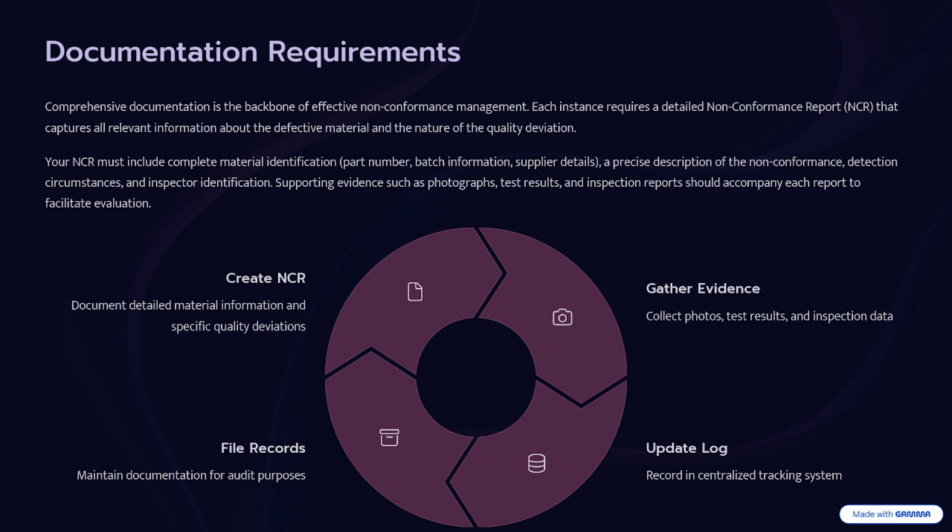So in simple words, this is how you can prepare a non-conformance report. The first thing is, whenever you find the material is non-conforming, you have to take the photo. In that material, if there are any labels or any codes mentioned, anything there, just take the photo of what is not the same as your approved material. Then you come back to your office, you have your own format of NCR.